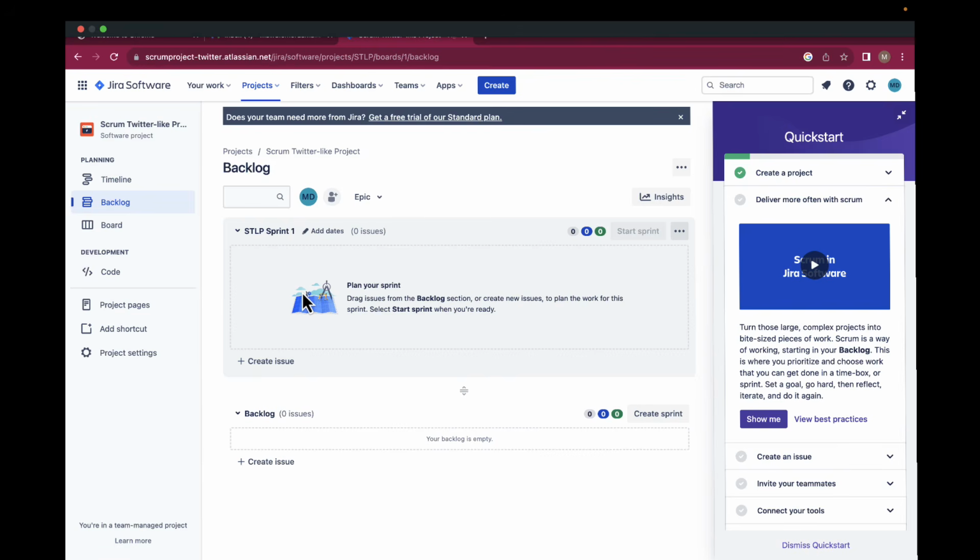And then also, if you're wondering what a user story is, or what a task is, a user story is simply a description of a feature as viewed by the user, and it's written in a way that describes who the user is, what they want, and why they want it. It's a way of creating a simplified description of a requirement. The typical format is: as a type of user, I want to, and then some goal, so that, and some reason for creating that story.